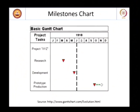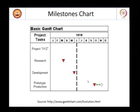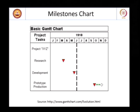There are different forms of a bar chart. Here is a sample of a milestone chart — you find there are no bars actually, but you have the same concept: time on the x-axis and activities listed. You are just placing points on when an activity should be completed or how much you can extend an activity. This is a very popular milestone chart. Typically, when you take the highest level of scheduling, it is more of a milestone chart.